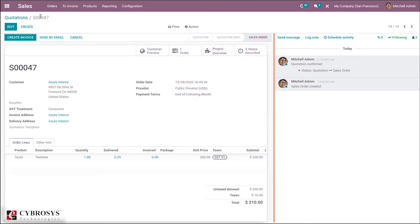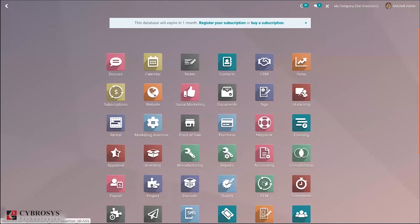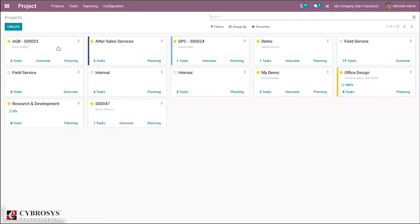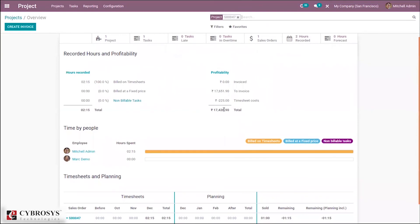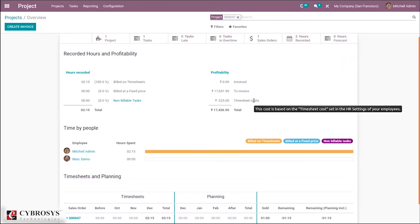Let's go to the project module. The project was created from a sale order, with one task visible. Click on overview and you can see recorded hours, billed on timesheet, hours spent, percentage rate, and the amount to invoice. The total profitability is calculated by adding invoiced plus to-invoice amounts, then subtracting timesheet cost. The timesheet cost is calculated based on time spent by the employee on the task, and the cost per hour for each employee can be set in HR settings from the employee module.